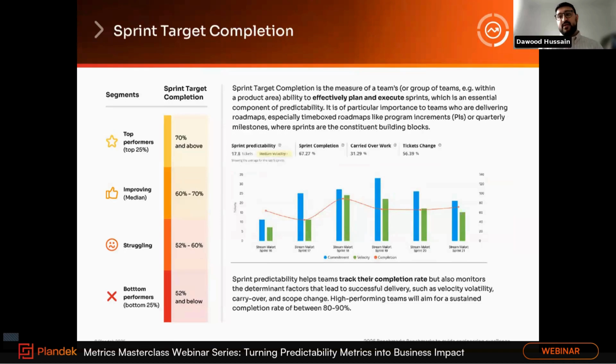So this metric focuses on what portion of the original work was originally completed. The reason why this is really important is because a good benchmark here is 70% or above, and below that suggests we're struggling to stay focused on plan work, or perhaps due to unexpected work or distractions. And so if we're completing our plan work, it means you've got a good planning rigor.